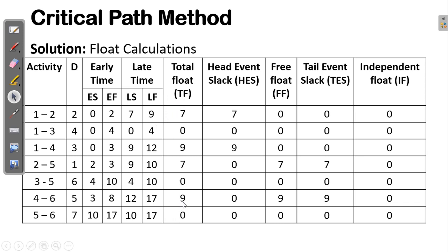Critical activities basically have to be started right away at the scheduled time without delay. That's why you can see the total float for critical activities is 0. But for non-critical activities, you can delay for some time, as demonstrated by the total float. The critical activities need special attention from the project manager, because any delay in a critical activity causes a delay in the project duration.